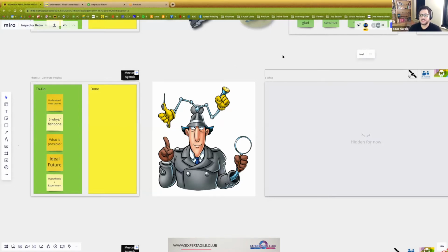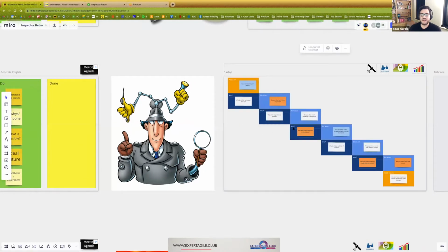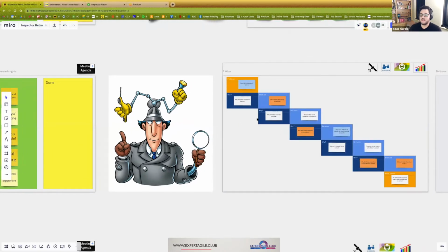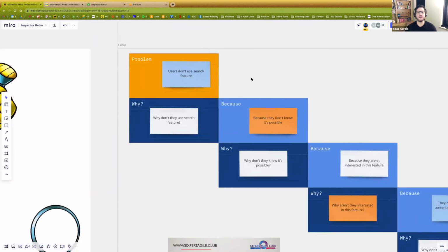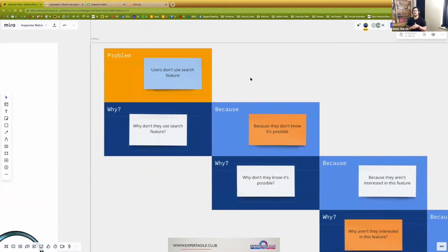One great way of doing that, some of you may recognize this concept, is called the 5 whys. I'll go ahead and zoom in on this. The 5 whys is just that easy. You pick your first thing. Okay, team, you said that when the manager came in and talked to you, he yelled at you, then gave you extra work, and that really messed things up, right? Why? And then they'll tell you why that was a problem. And then you just keep asking why.